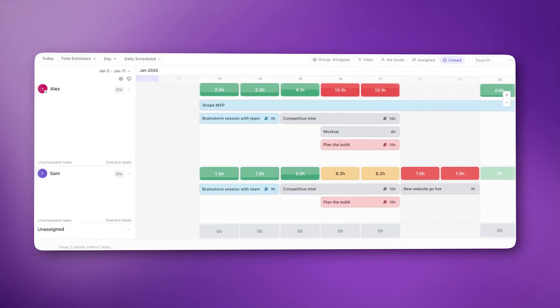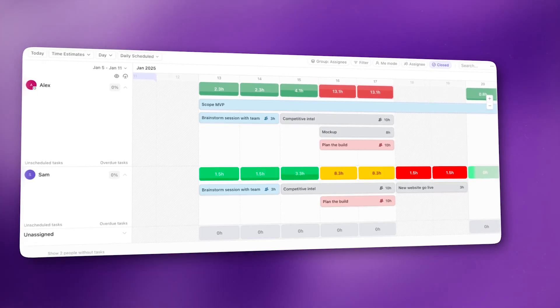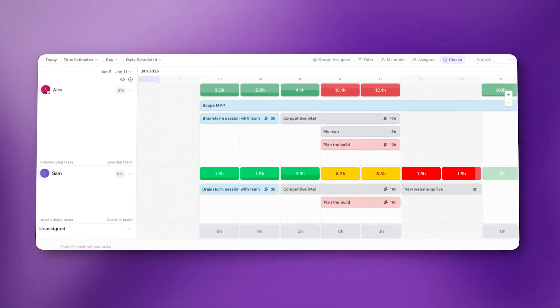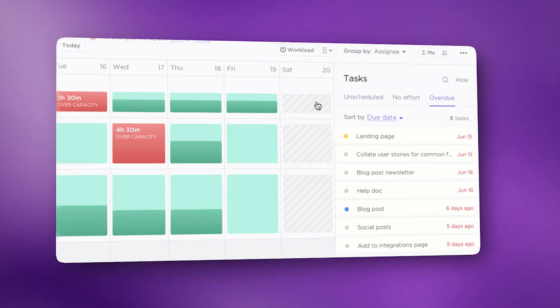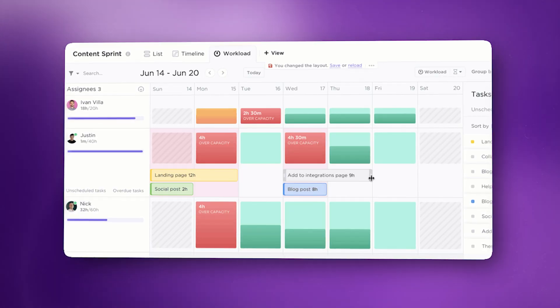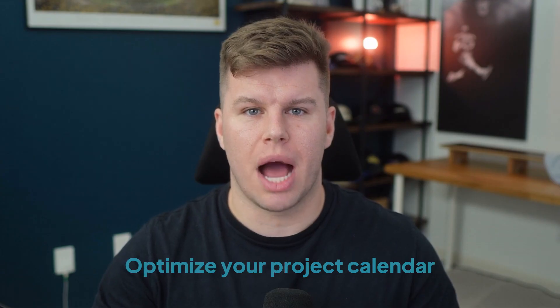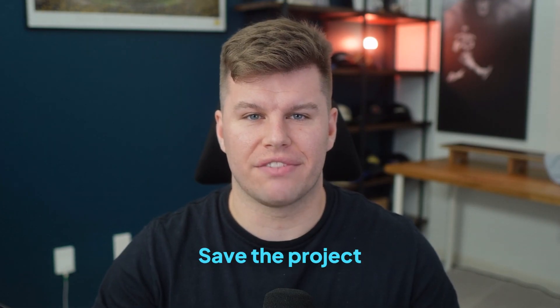In ClickUp's workload view, each person's capacity is displayed in shades of red, yellow, or green. Red means overload, while green means they still have bandwidth. You can drag and drop tasks to reassign them between team members until everyone's balanced. Burnout kills more projects than bad ideas ever will — balance the load, optimize your project calendar, and save the project.